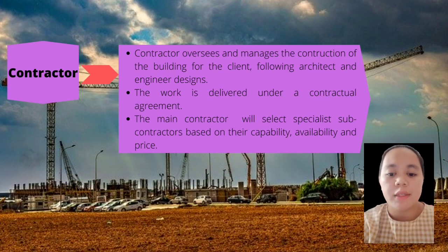The last one is the contractor. The contractor oversees and manages the construction of the building for the client, following the architect and engineer design. The work is delivered under a contractual agreement. The main contractor will select specialist subcontractors based on capability, availability, and price.